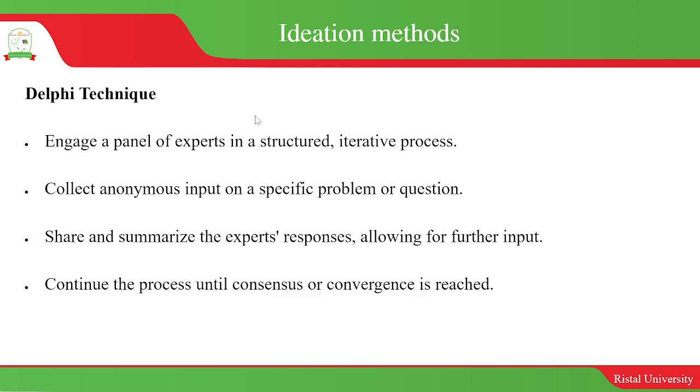And then we have the Delphi technique. For example, you could have a problem and you have multiple ways of solving it. You're having a hard time choosing which way to solve the problem. You can use this technique to send out questionnaires, or just a few questions, not a very complicated questionnaire. Choose a few experts in the field of that problem. Ask them to give you their responses on how they can solve the problem. So if you have 5, you tell them to list.